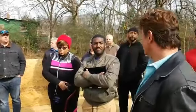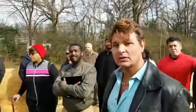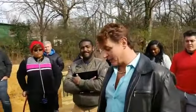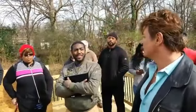So, in general, is it typically more expensive to go up or to go out? No, it's a lot cheaper. If you're going up, you're killing two birds with one stone. Your price per square foot is 25 to 35% less. A lot more people go up than out.